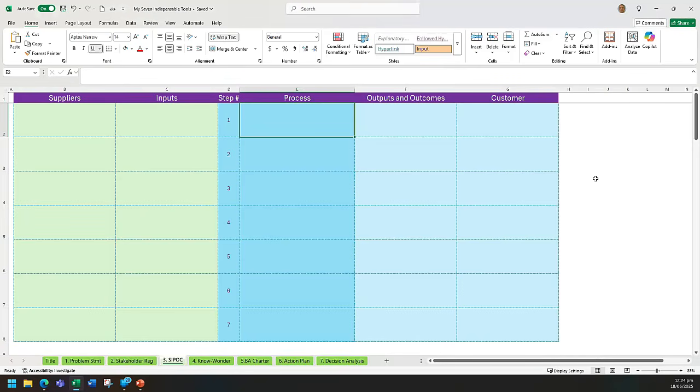And then you can add in other little bits and pieces along the way. I've done one recently where people wanted to record what decisions are made at each part of the process, so we had a column for decisions. We also had another column for risks: what risks are we facing at this stage? The risk could be that the person who's supposed to be doing that step is resource constrained or something like that. You can put that in there, and as soon as you can see that, you can talk to them and explain why it's important that they make the time frame. So I find the SIPOC super useful.